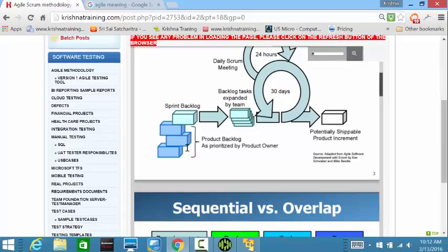Now, within that particular sprint, every day the scrum team we are talking about, four developers and two QA people, needs to provide the status to those six members. One scrum team has six members, right? Every day for 15 minutes, they get together and update the status to each member of the team.